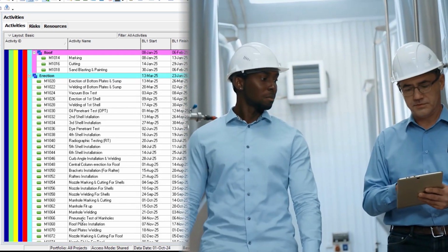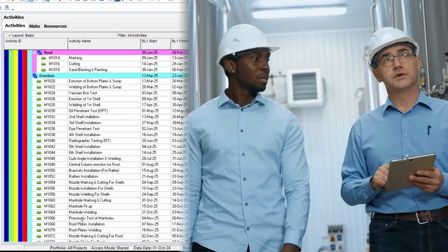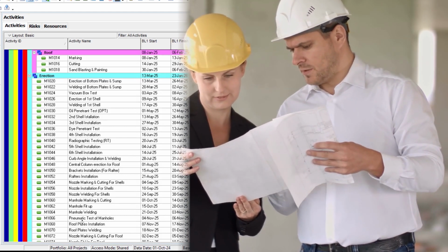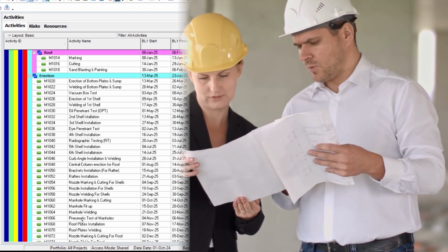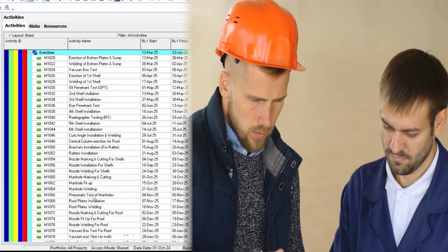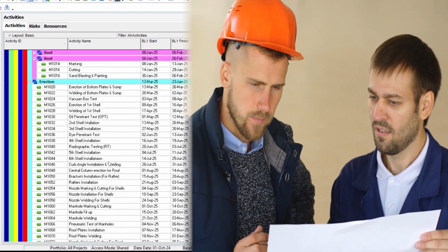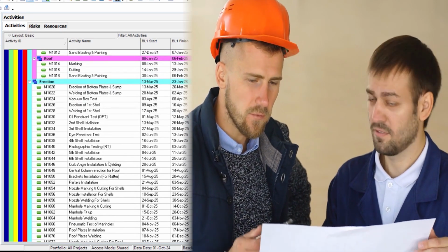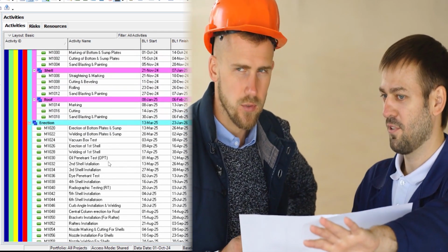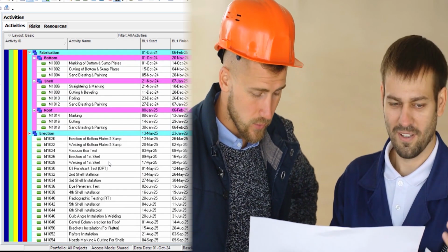There are pressurized tanks, there are vertical tanks, horizontal tanks, but overall, I was explaining over here diesel storage, crude oil storage tank, right? So these are the general activities specific to a project fabrication, and you can gather the data, you can make sequence and create their critical path method, link all the activities with respect to their dependency. If you are a new one, you can talk to your project management team, but my intention is to deliver this data as per the industry oriented practices.